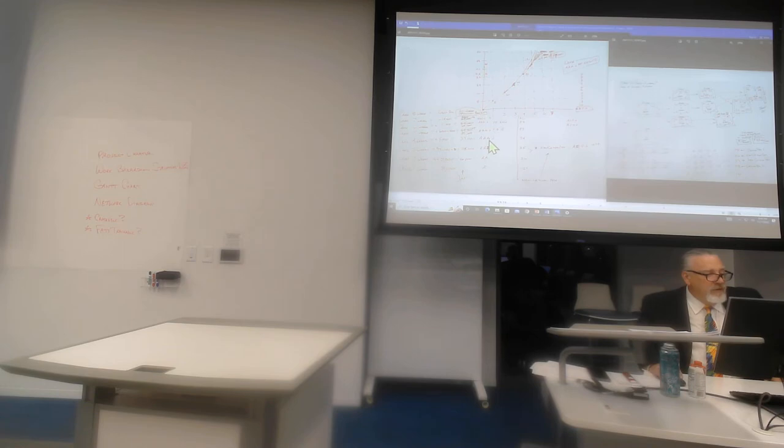Now we can do another A and get us down to 24, right? Because A is on all three of those critical paths. So that gets us down to 24. Our cost is at $33,000. Then what do we do? What do you guys do next?